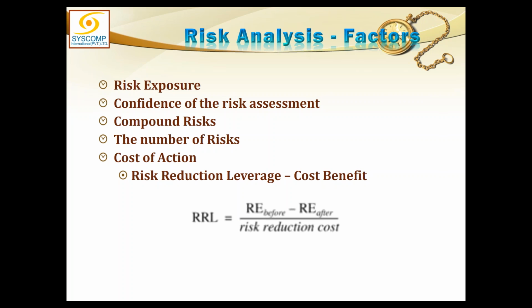So naturally the balance of the risk would be 10,000. Previous risk exposure was 1 lakh, so 90,000 will be the reduction in exposure. And when I calculate the cost of replacing the wire, all the ducting and wiring and all that, it comes out to be 1,50,000 rupees.